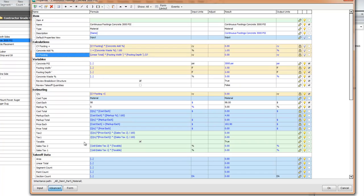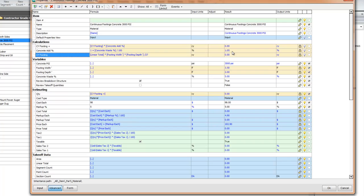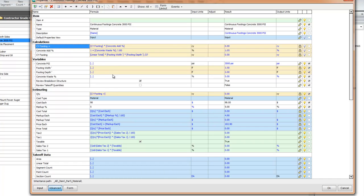So here is the neat concrete. The linear total, that's from right down here, and you can see that's inherited again from the top level, and this is your takeoff that's provided by PlanSwift, times the footing width, which is in feet, times the footing depth, also in feet, divide by 27. So that's our neat calculation, but we need to add waste to that. So here is the line that calculates the waste factor, 1.05. If you change the waste to 3 or 4 or 2 or 7 or whatever, then this factor will change. And then the waste calculation itself is the footing times the add percent, and then this value here is brought down into the quantity where it's arrived at.